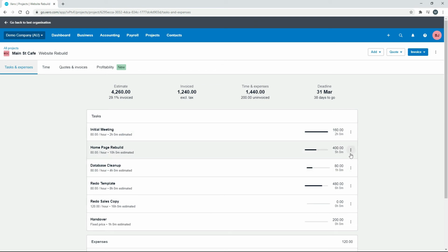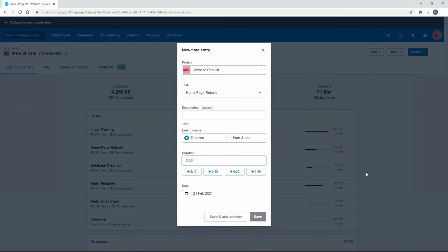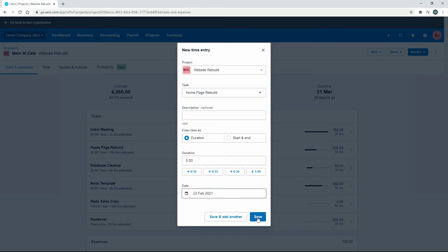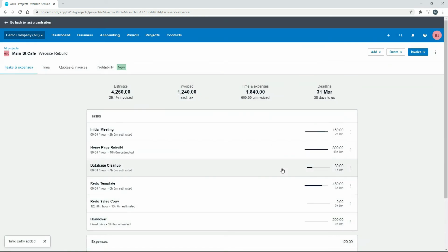Okay, so let's go back to here. And we'll go add time. And for this one, for the homepage rebuild, we had budgeted 10 hours and we've done 5. So let's just say we got it exactly right. We'll do another 5 hours and we'll do that on the 23rd and click on save. Okay, so you can see the progress bar there is now full